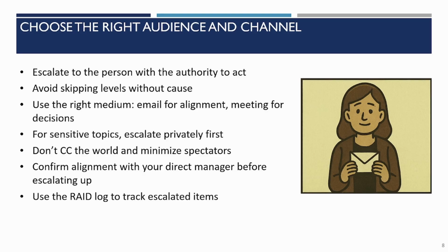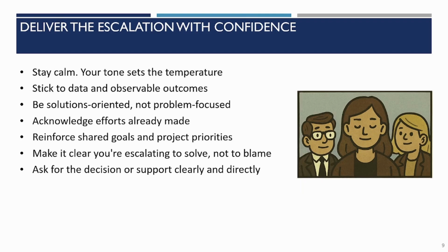You don't want to carbon copy the world on emails if it is an email, because you don't want this to get passed around and so on. Which, by the way, is another lesson learned: when you're writing it, write it as if somebody else is going to read it, because that's probably what's going to happen. Another reason why you don't want to blame anybody in an email. And you definitely want to document these escalated items in your RAID log, because most likely if you've escalated it, then it's a risk or an issue.